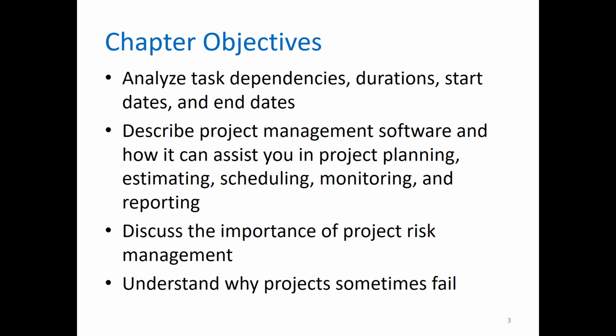The next point is we'll discuss the importance of project risk management. What are project risks? How do you manage them? How do you mitigate them? Actually, there is a process. You need to identify the project risks, then you need to assess them, and then you try to mitigate them, which is the management phase. And then after that, you need to monitor. Just because you have mitigated the risk, it may not mean that it's not going to come back. It can always come back. The risk can always be associated in the future. So you need to monitor and control it.